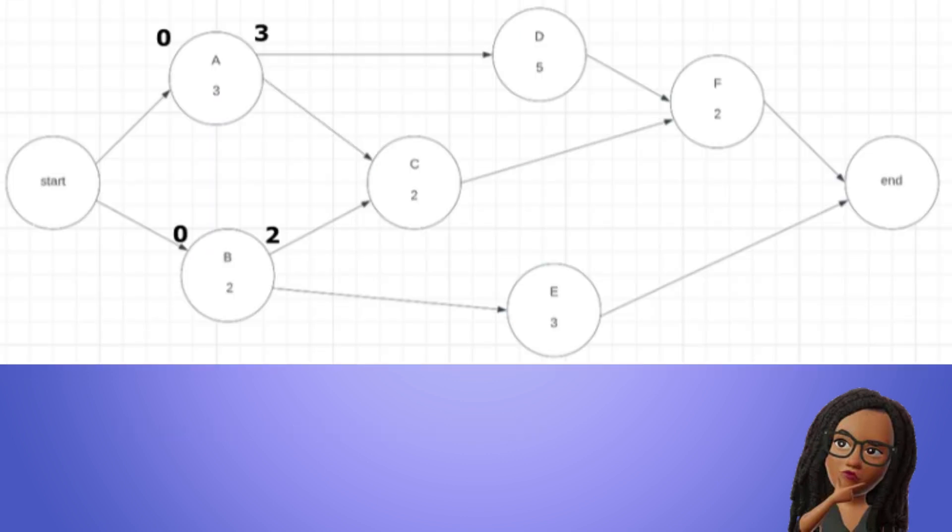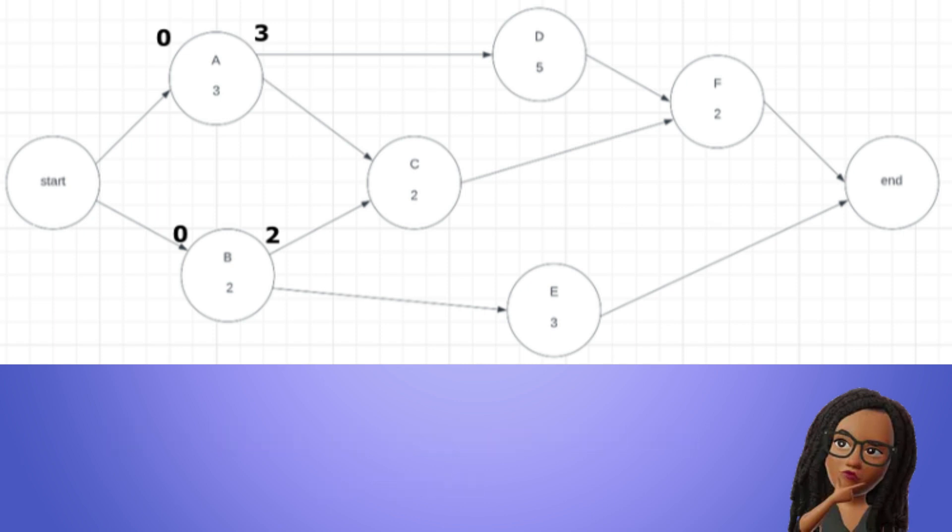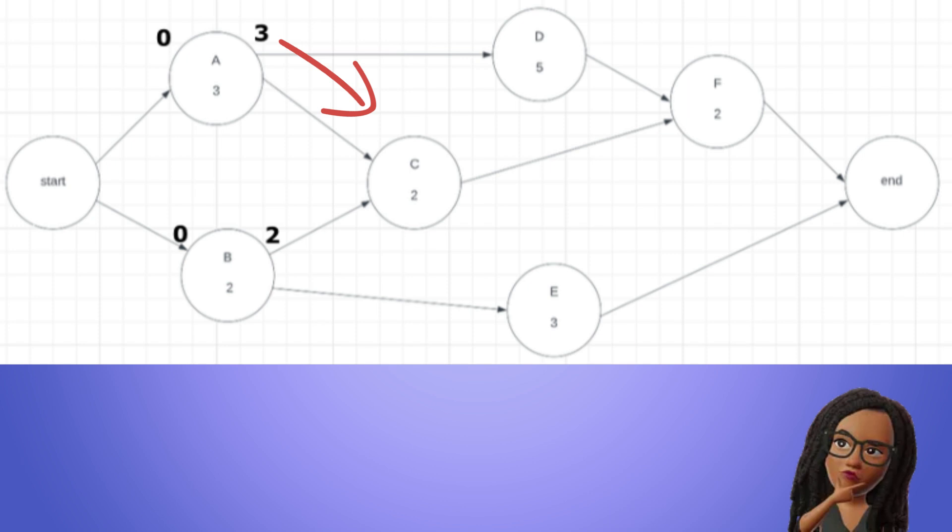Now what's the early start of C? C has more than one predecessor and we know that the early start of an activity is equal to the time when all its predecessors are complete. We see that B is complete at time period 2. However, A does not end until time period 3. Therefore, C has to wait on A to end so its early start time is 3. C's early finish is equal to 3 plus 2 equals 5.